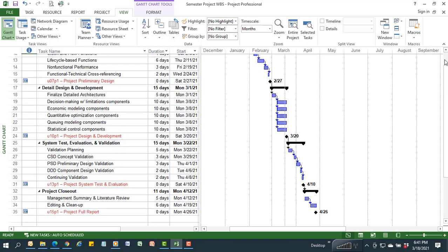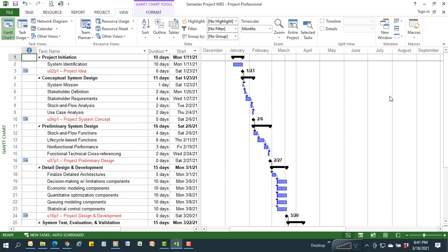So again, the project plan is fairly easy to develop because it's date constrained by the project assignments, which happen to be phase based. So that gives me my amount of time. What I did is I listed the main activities I need to be working on and the number of days for each. This isn't gospel. I can certainly do my plan a different way. But if I'm 6 days into the conceptual design activity starting in late January and I still haven't even finished the first 2 tasks, I know I'm falling behind.